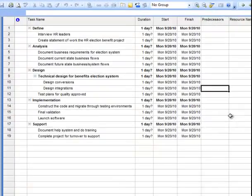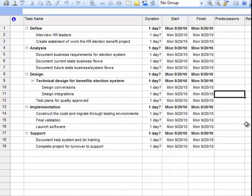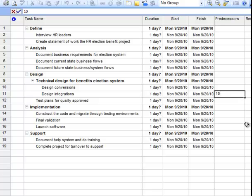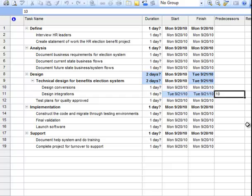If task 11 needs to finish after task 10, I simply enter 10 as a predecessor. And you can see that the dates are starting to automatically calculate, which is great. I'm doing the parameters and the tool is doing its job to forecast the schedule.